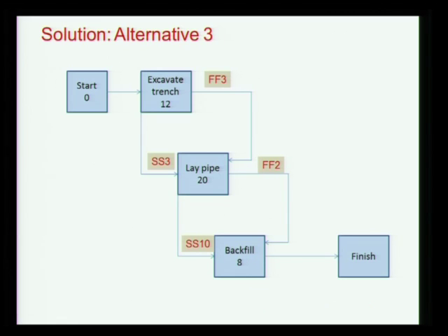So what we are saying here is, I have to excavate trench. My laying pipe can start 3 days after excavation, and I am also constraining laying pipe with a finish relationship. And is this reality now? Yes, this is more like the real project.